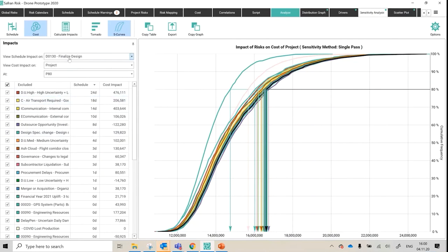If you think about it sequentially, the mitigation is proposed and dealt with during procurement, which is in advance of finishing the design in this particular fictional project. So that also might have some useful connotations for you as well. So I'd just like to point that out.